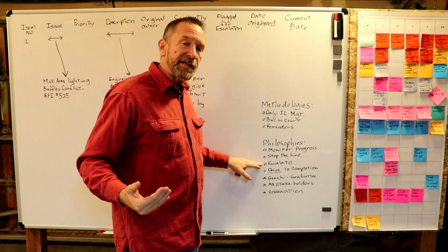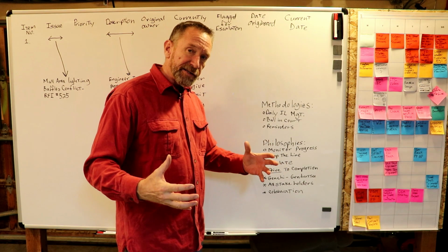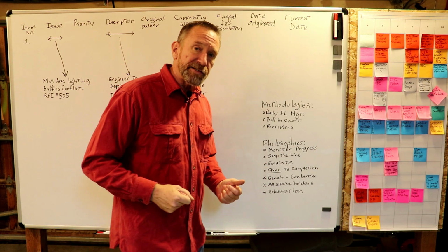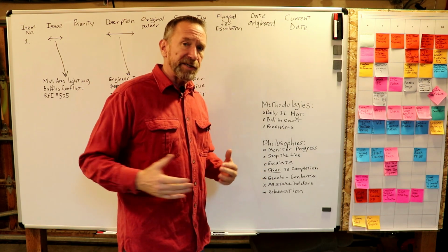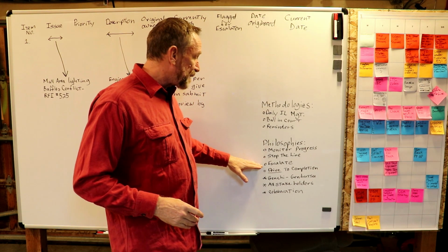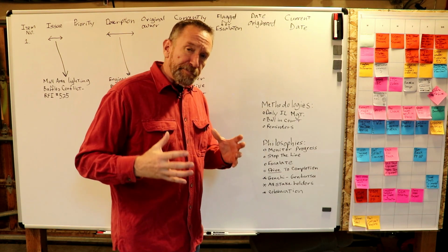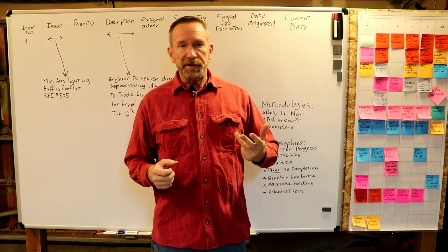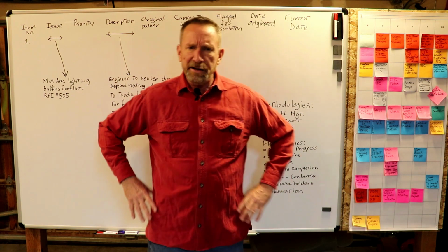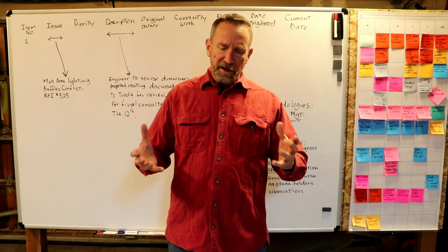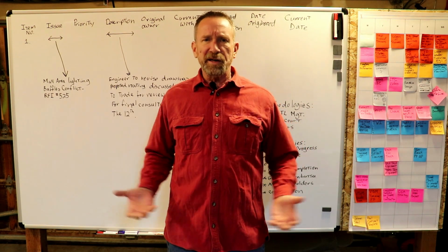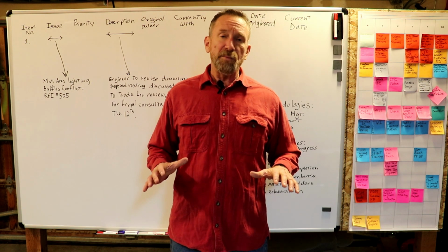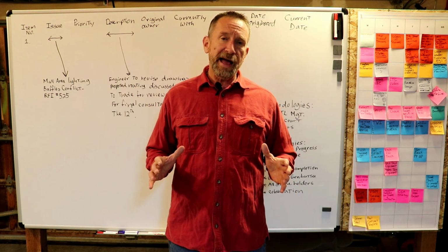And if you're going to have a process to escalate, you've got to get that group together ahead of time and really explain it to them. And there has to be a solid process to escalate, and it has to happen in minutes, most hours, but never days, weeks, or months, right? Escalation is absolutely key, but the top brass, so the CEOs of the architecture firm and the contracting firm and the ownership group and the CEOs of the trades, the big guys, they're all going to say, well, now you guys are just going to push everything up to us to solve it, and we're ahead of time, we're already mad because we think you're going to just push it all up to us. And we have to understand, if you abuse the process like that, they will not support us, right? I've watched that happen. It doesn't work.